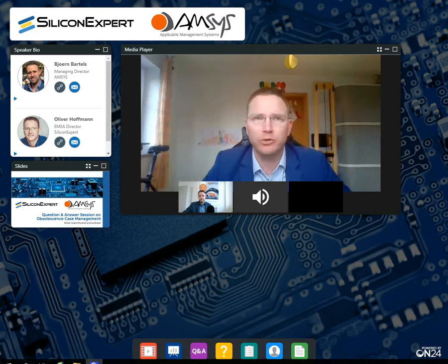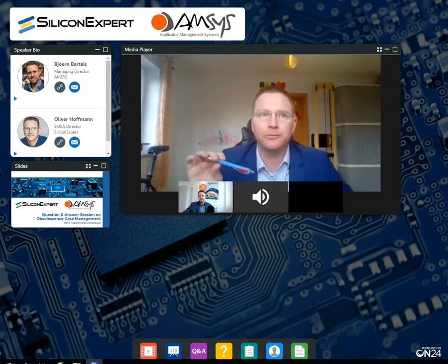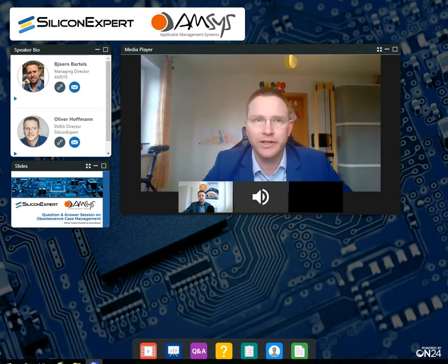The combinations that are monitorable over time would be the increase or decrease of stock and its trending. In case of demand increasing too much, as an event that begins towards an allocation, stock goes down, and price and lead time go up. That also happens for a component that is still in demand but going obsolete. So stock going down and price and lead time going up might be an indicator. If it is a single component within a category, I dare to call it the ambassador of obsolescence coming, based on data points.